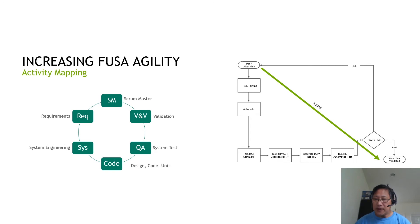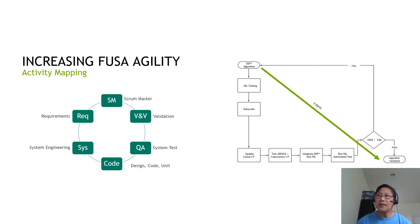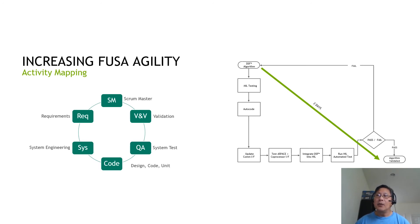The development process on the coprocessor needed to be repeated whenever algorithms were updated. Changes in interfaces between the coprocessor and ECU required driver changes and validation. As you can see from the activity map, interface changes required model-in-loop testing and code generation, updating all COM interfaces, testing integration of the DSpace and the coprocessor, integrating into the HIL bench, running automated tests with pass/fail criteria — and if the algorithm passed it was validated, otherwise it failed. The whole turnaround time for this activity map was about two days.